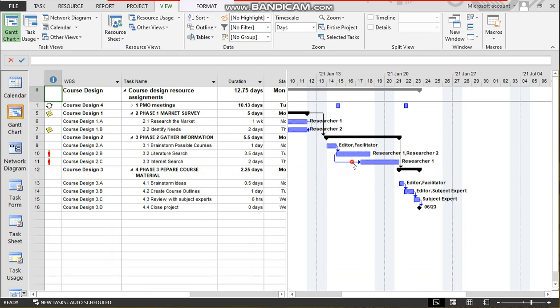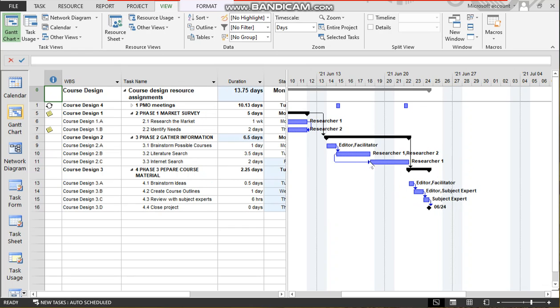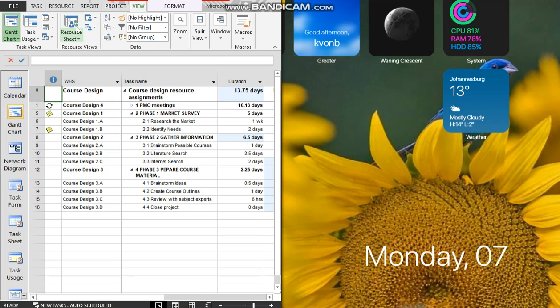The next way is in fact to do the following, is to change the relationship. So we can actually extend this by introducing a lag of 1 day. Problem disappears, which is the reverse of what I did just now.